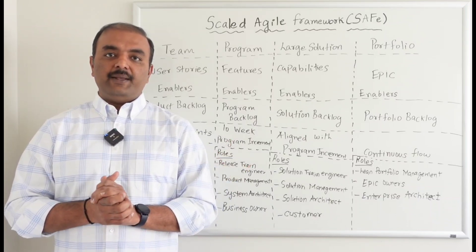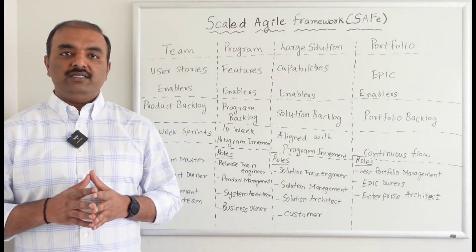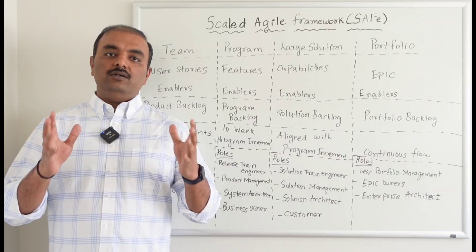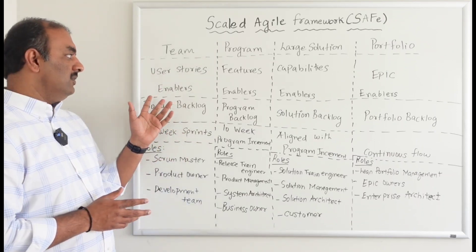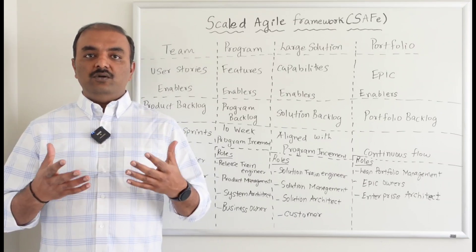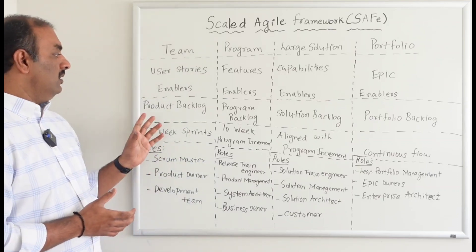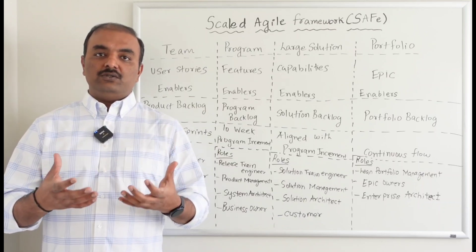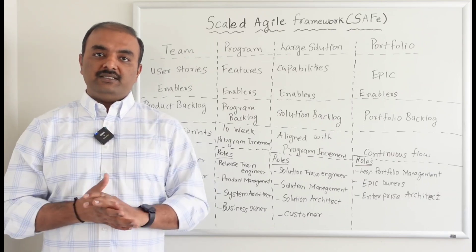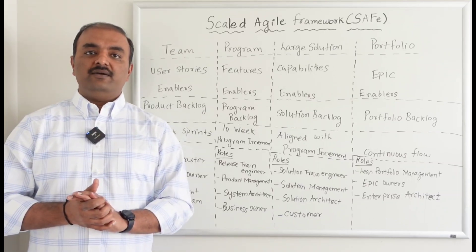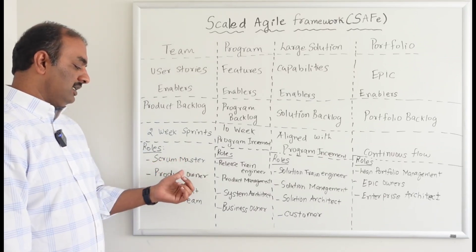So let's focus on today's training. What is the Scaled Agile Framework? If you see column number one — Team — most of us are already working on Agile and are well aware of these terminologies. In Agile we have a team where we work on user stories and sometimes enablers. Enablers are the initial setup work we have to do before doing user stories, like setting up a database. We have a product backlog which lists all user stories so we can work based on priorities, with two-week or three-week sprints, and roles like Scrum Master, Product Owner, and development team.